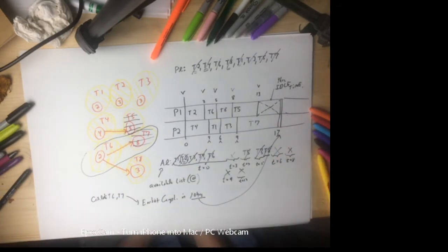I have 2 reasons to say I don't think I like this schedule. I didn't hit the earliest completion time, and I have idle workers. It doesn't mean at this moment that this is not the best you could do with 2 people. But it's probably the case that if I throw 3 people at it, it would do better.